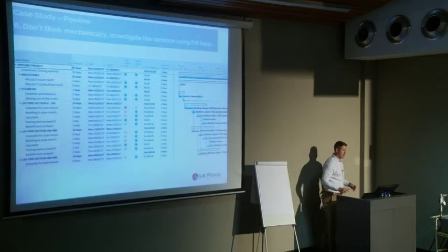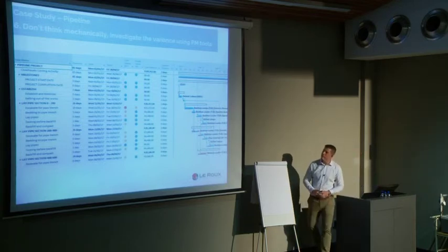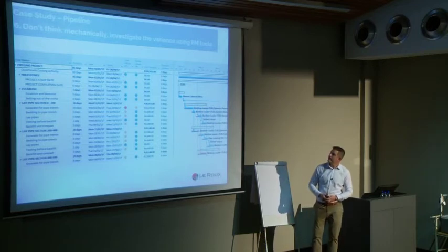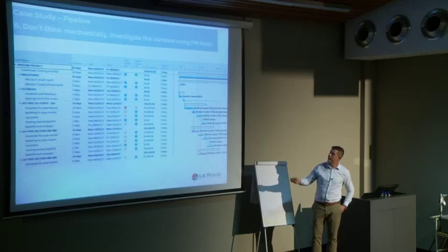And again, MS Project is extremely helpful in this regard because we can build in metrics, as I've done over there, to go and ask the question, where are there duration variances on my project? And if you look at those activities there, can you point out to me where they are? The first one, I think, is that excavate for pipe trench. There's a 2-day duration variance. That means, and you can see it there on the baseline as well, it's extending past the baseline. So we've only allowed for 10 days. It's taking us 2 days longer.